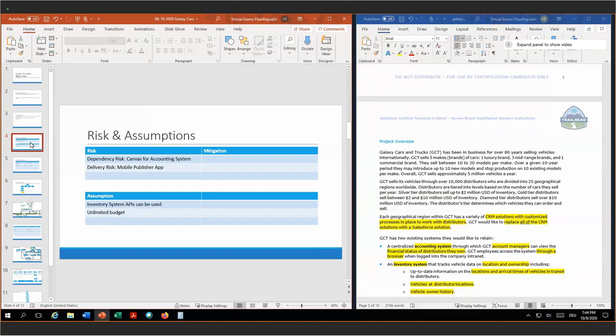For the dependency risk, we have to define, together with the team for the accounting system, milestones, contract-first development, and the requirements. And throughout the project, make sure that we achieve the agreed milestones. For the mobile publisher app, the iOS App Store and Android Play Store can take between days and weeks. We should account for that and submit the app early on.